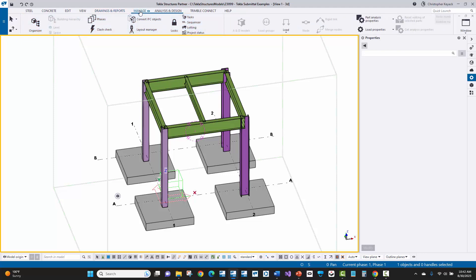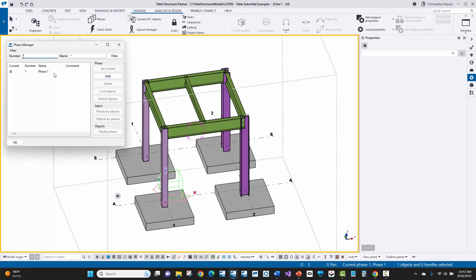Another key thing to keep in mind as the detailer is sequences or phases. Here on the Manage tab there are phases, and you might have different sequences on the job. In the Tekla EPM and PowerFab export, both the phase number and the phase name do get exported. But you need to coordinate with the fabricator and tell them which particular phase name or phase number they should be reading — which field they should be reading — to tie that back to sequences in Tekla PowerFab or Tekla EPM.